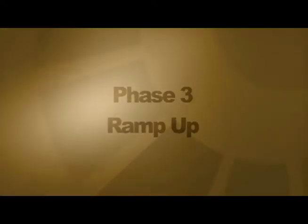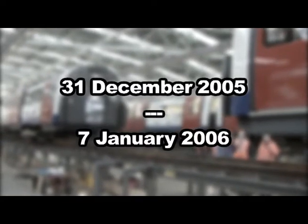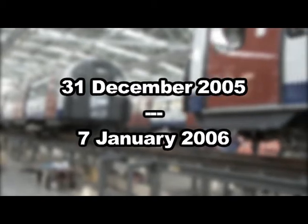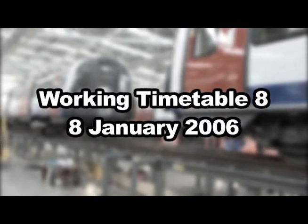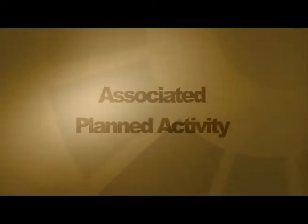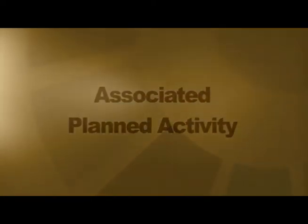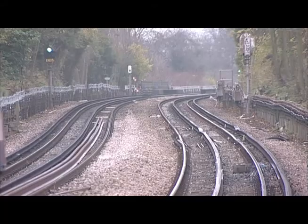Saturday the 31st of December 2005 to Saturday the 7th of January 2006 will be the period that will see the peak service on the Jubilee gradually increase to the level required by the Working Timetable 8, scheduled to commence on the 8th of January. From the beginning of the 31st of December, only 7-car trains will be in passenger service on the Jubilee Line. During the ramp down and ramp up periods, the service timetables have been designed to keep the peak service frequency to as high a level as possible, using the trains available.